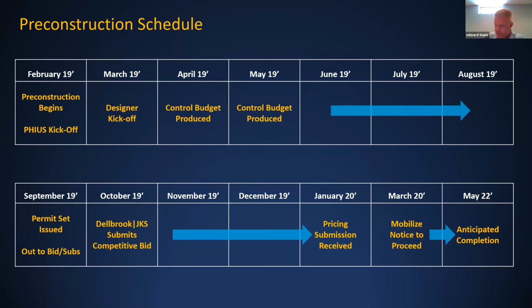And that's a really big piece when people talk a lot about price point and affordable housing. Most affordable housing projects now are trying to achieve passive house, from an estimating perspective and a cost perspective. So as part of my presentation the last time on BSA, it's super critical that your baseline budget is a reasonable budget. It has code, it has stretch code, it has the mechanical code, it has all the normal everyday stuff covered in the basis of your control budget, because if not, your passive house cost delta will be a little bit higher.